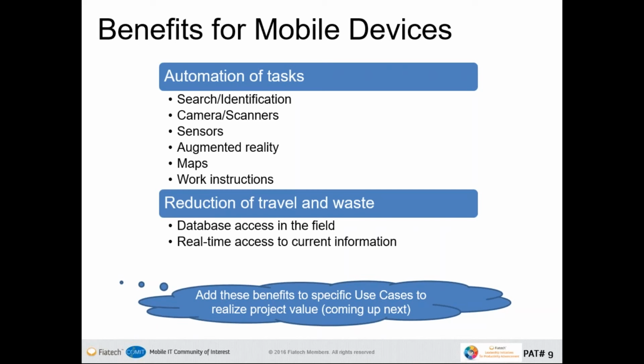Also, the camera adds a lot of automation to that. So if you're taking photos of the items for, let's say, materials management, if you want to do a material receipt report and you need to take a picture because it's damaged, that's built right into the device, and so you're not having to take a picture, upload it to your FTP server, or package it in with your material receiving report. So all that's built in, making it a kind of one-stop shop.